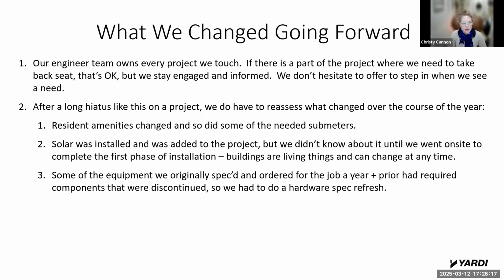But the other thing too is when a project takes so long, there are so many things that change in a property over that course. We've had this happen even on commercial, not this specific thing, but a long lag time between when we spec hardware and when the client's actually ready to roll it out. You've got tenant improvements that happen. You've got all kinds of things that change at that property, where what you originally spec'd might not still be appropriate or even, in some cases, available. We've had hardware that is no longer available.